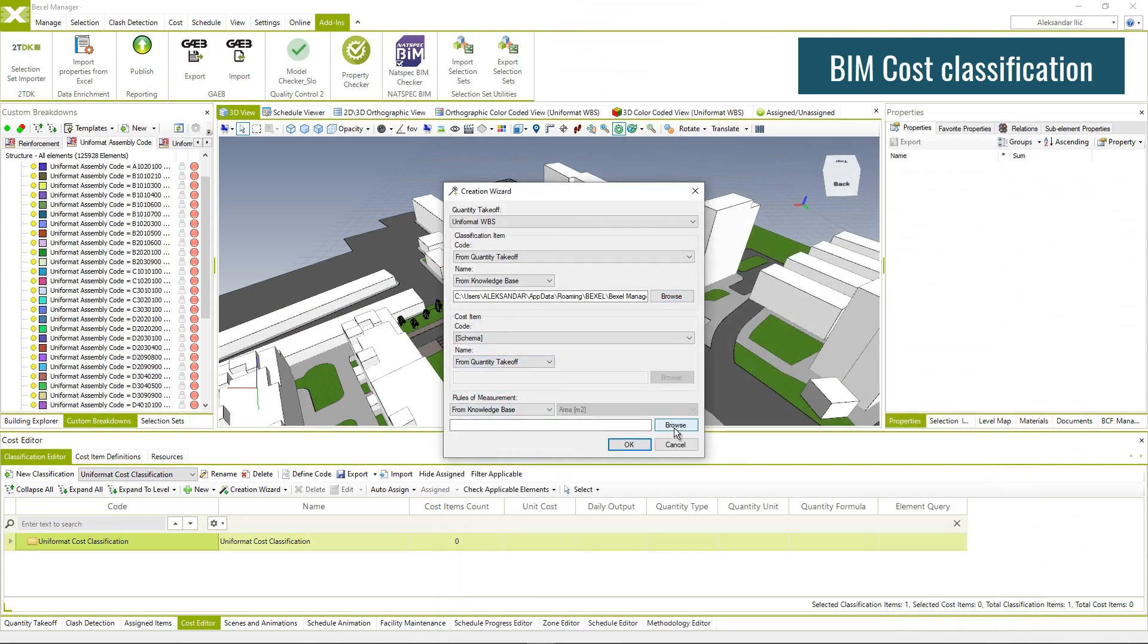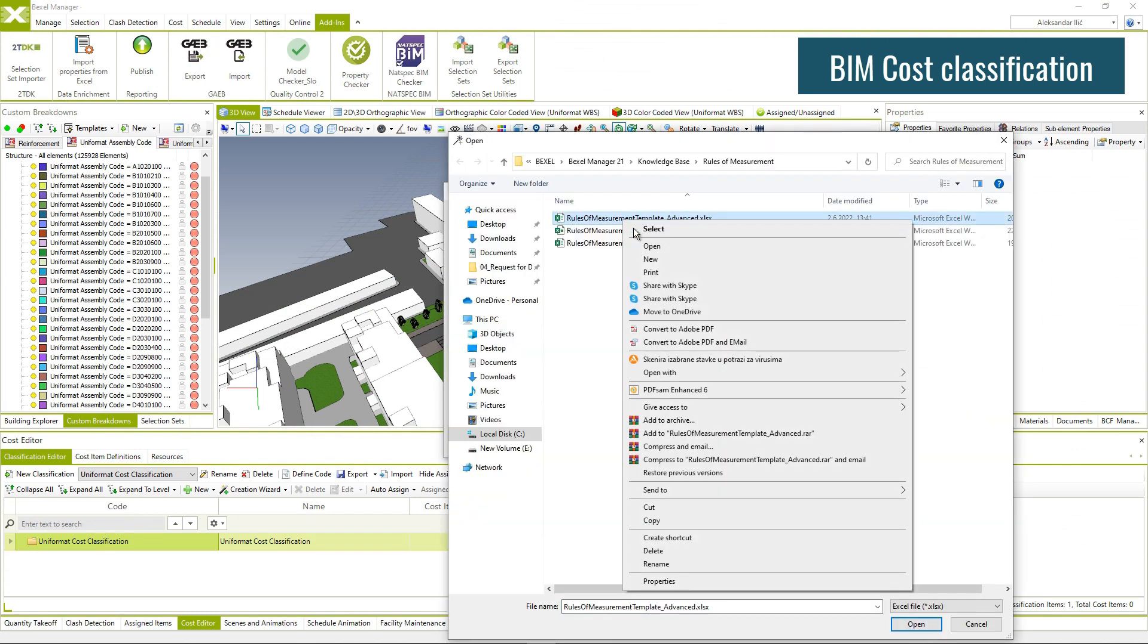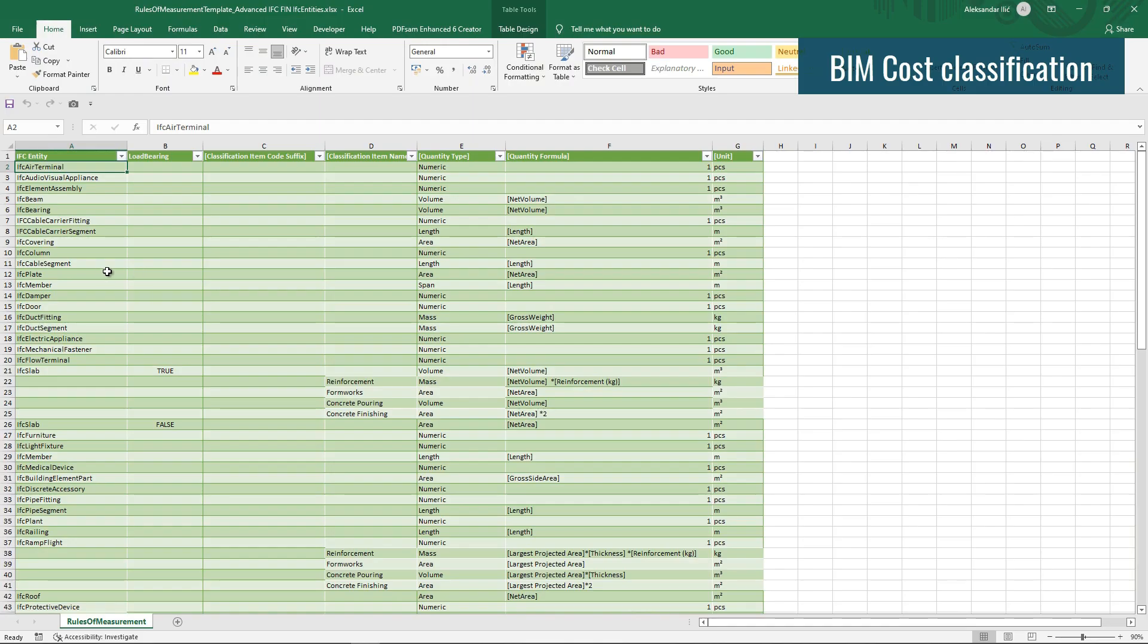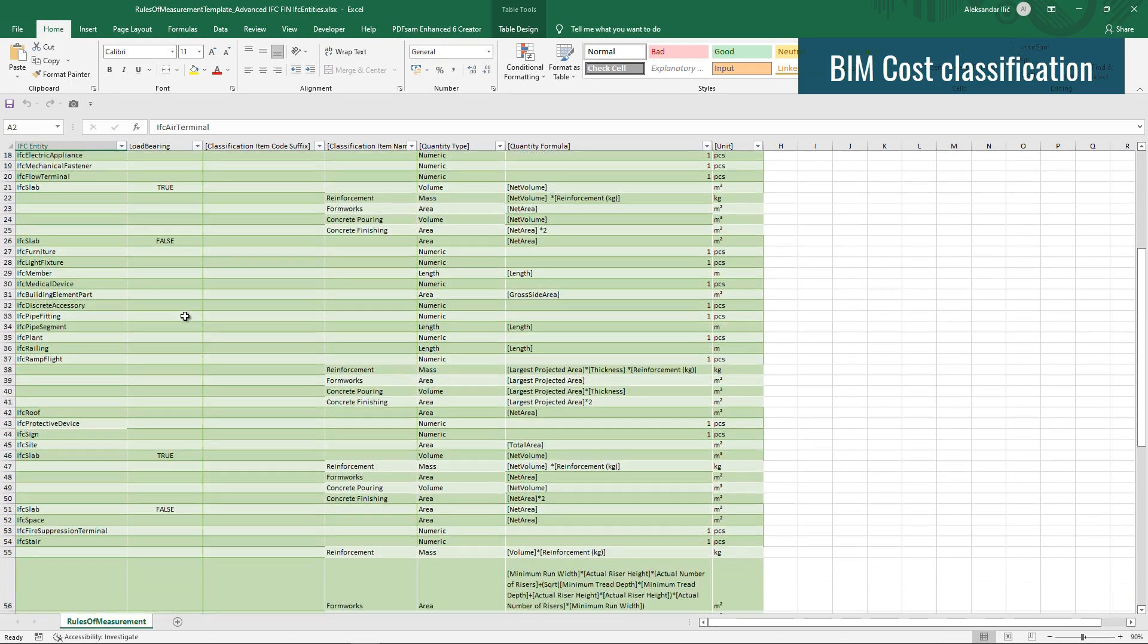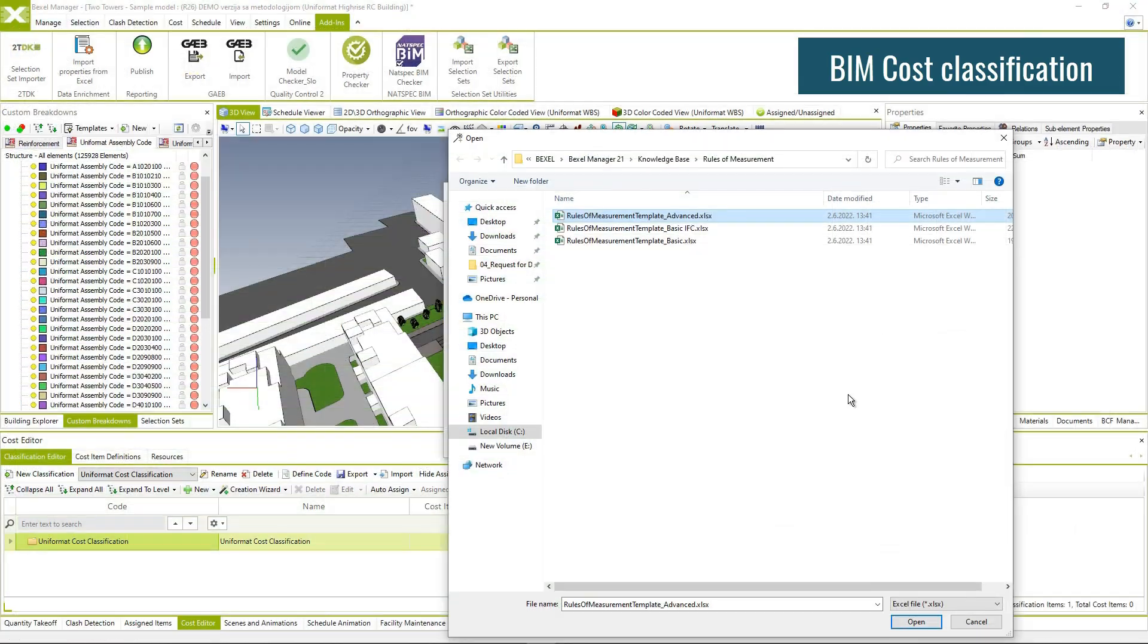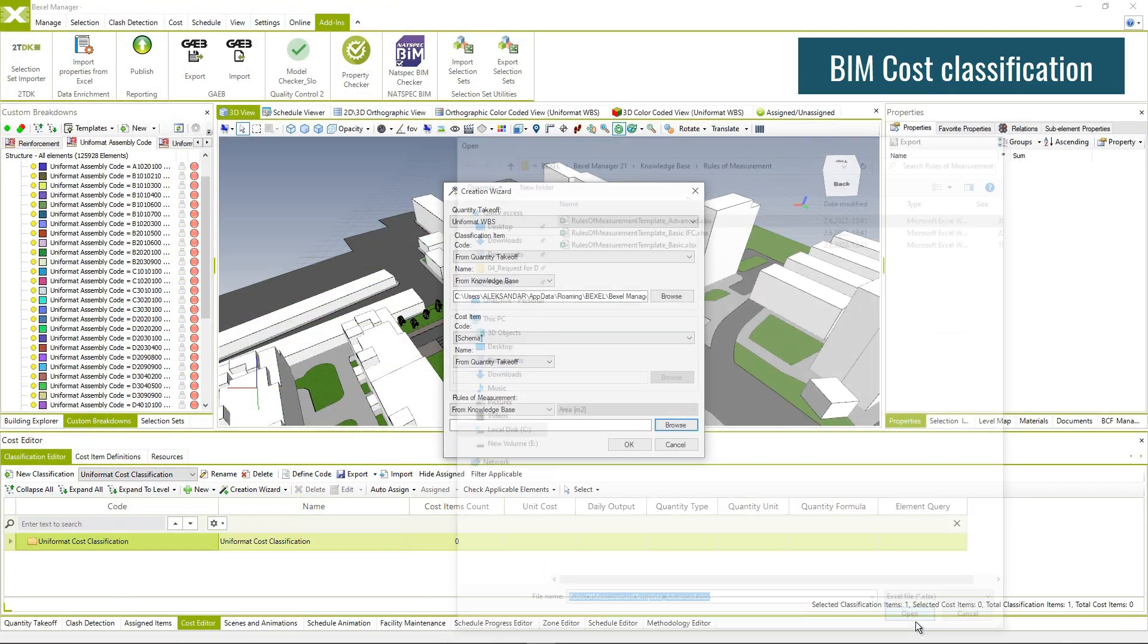Use rules of measurement template to instantly add quantity type, formula, and unit to BIM cost classification.